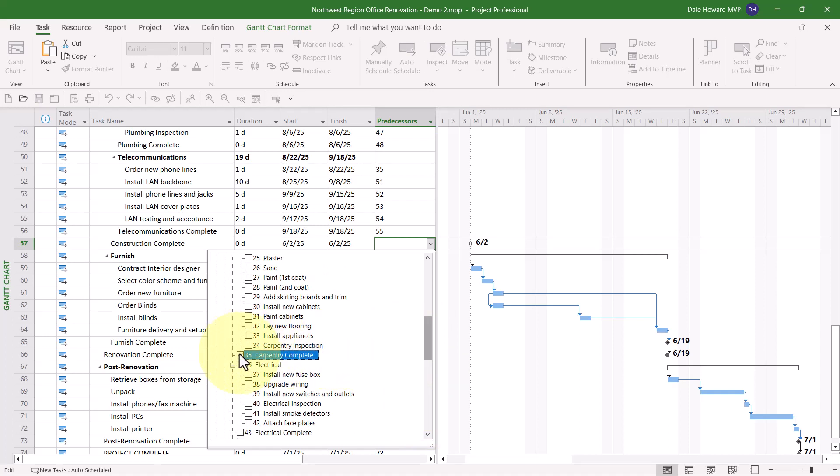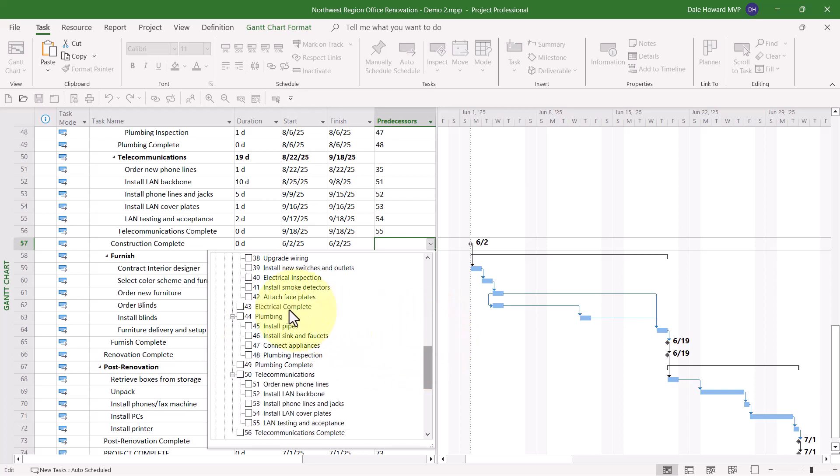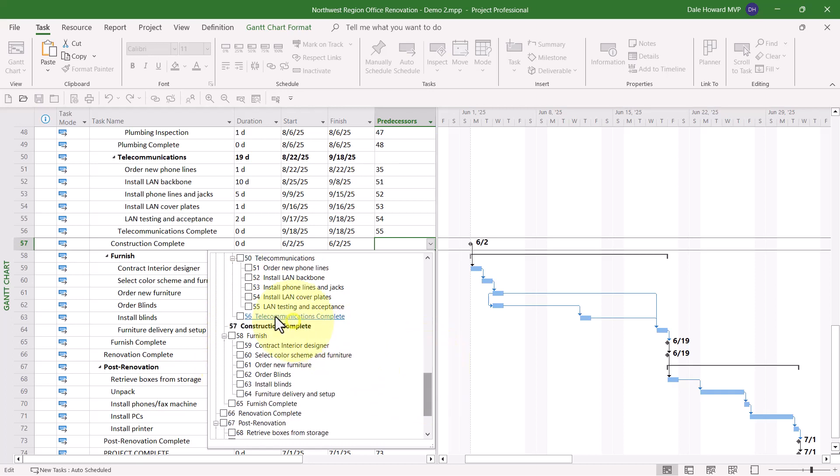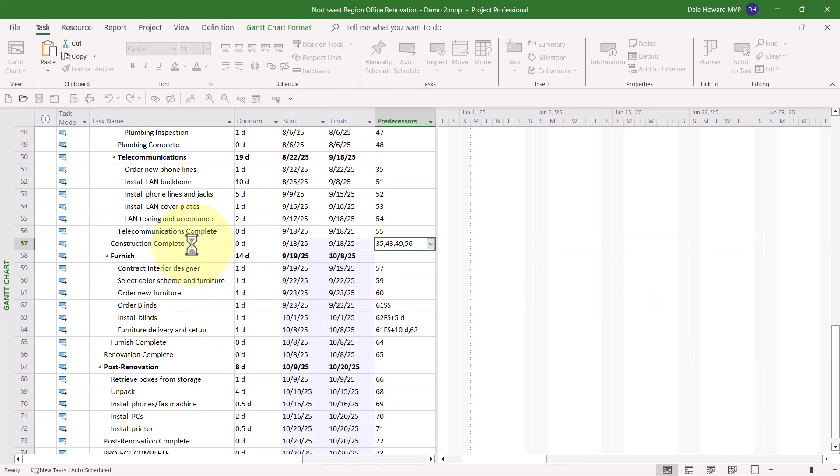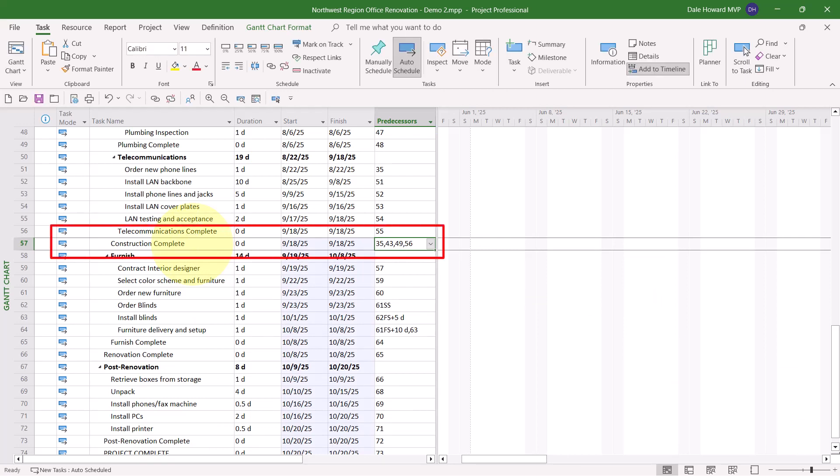So here's what I can do. I can select number 35, Carpentry Complete. Number 43, Electrical Complete. Number 49, Plumbing Complete. And number 56, Telecommunications Complete. When I click anywhere outside the menu, Microsoft Project automatically lists those four milestones as predecessors to this task.